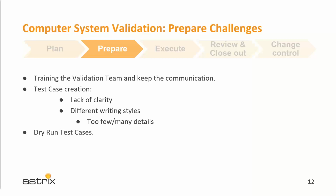And these results typically have three possible outcomes: A being test passes, B being test fails because of test script issues, and then here you need to make corrections and implement those corrections before your next run. And then C will be test fails because the system requirements are not met. And here you need to update the IQs so these issues are not seen during the official execution.